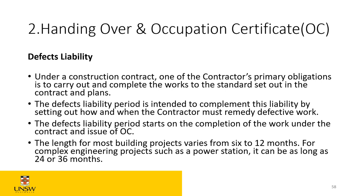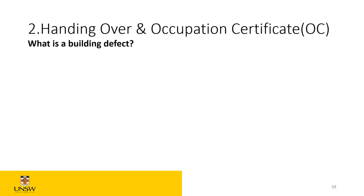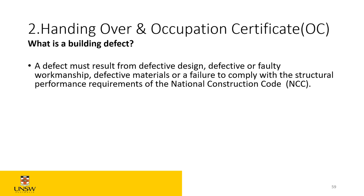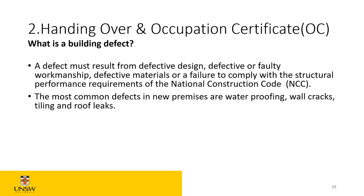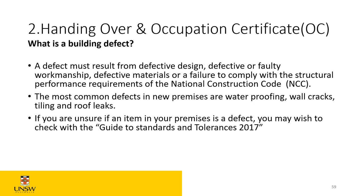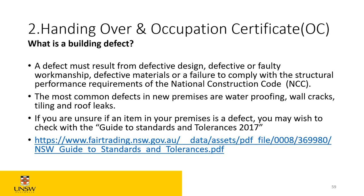A defect must result from defective design, faulty workmanship, defective materials, or a failure to comply with the structural performance requirements under the NCC. The most common defects in new premises are waterproofing, wall cracking, tiling issues, and efflorescence. If you're unsure whether something is a defect, there are guidelines and tolerances — from Fair Trading — that you need to reference. Sometimes a little cracking is acceptable as buildings settle, but when you measure a major crack against the tolerance guidelines and it qualifies as a defect, you can call the builder to fix it.